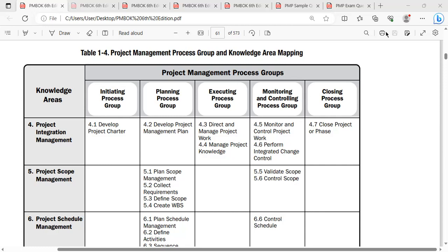So you need to predict your outputs. For you to predict your outputs, you need to bring all your management plans to a detailed level, right? If you want to get your information in detail, you are going to transform the summary information into detail level information. You need to send your representative to collect the complete specifications and requirements from the stakeholders. Until the stakeholder list is complete, you're not able to send your representatives or proxies to collect the specifications or the requirements. And one of the important things is that you're not able to develop your stakeholder engagement plan, and you're not able to develop your communication management plan without the stakeholder list.